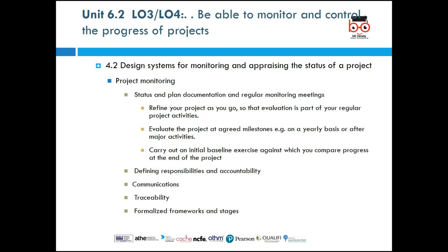So we need to refine our project as we go along so that evaluation is part of our regular project activities. Evaluate the project at agreed milestones, for example, on a yearly basis or after a major activity, and carry out an initial baseline exercise against which you compare progress at the end of the project.